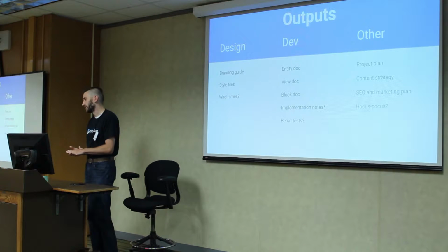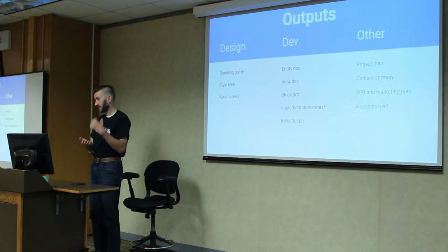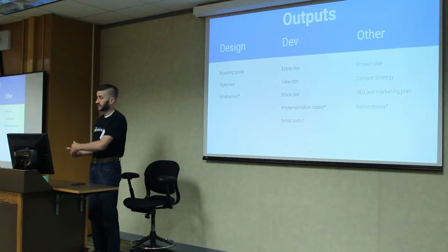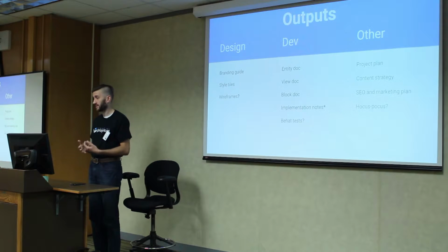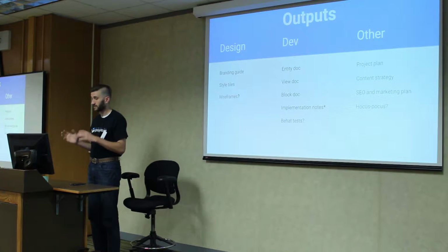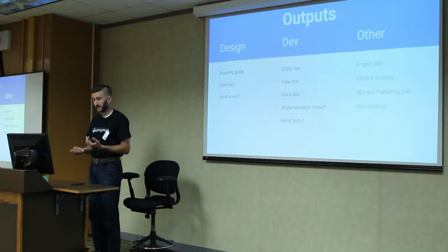Wireframes is sort of an open question of whether to provide them in the discovery phase or whether to do it early in design. And it really depends on how much bandwidth your designer has. If they can devote time to the wireframing at that point, since it is such an intensive piece, then that's great. If it's going to be a bottleneck, then being realistic about that can be useful.